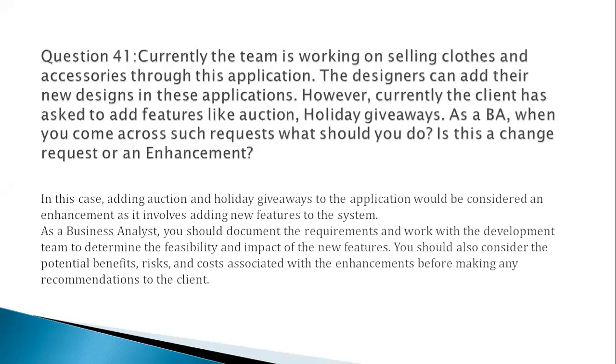Now if you look at it, these two are called enhancements because we're adding two new features to the system. It is not a change request. It is called an enhancement project because we are adding two new features to our application. As a business analyst, what should we do? I will document the requirements and again do a feasibility study and impact analysis on these two requirements. And then I will look at the benefits, risk and the cost associated. And then I will take the recommendation. So this is how you need to explain the answer.